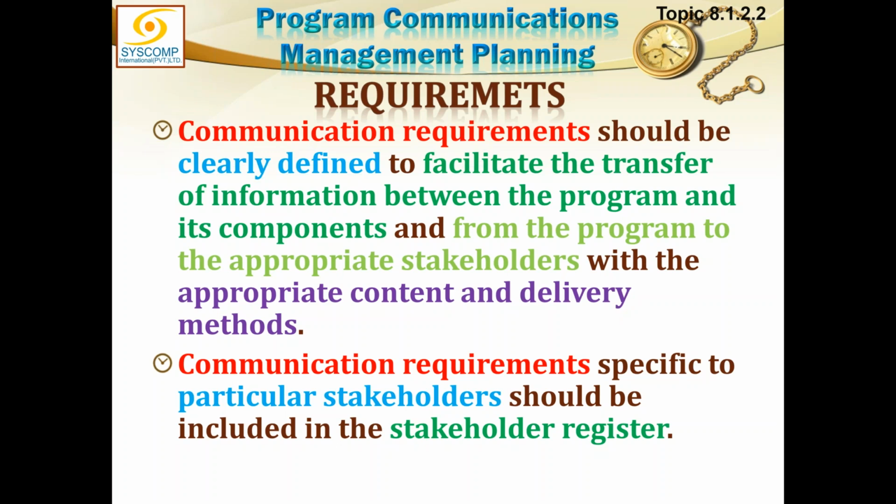Communication requirements specific to particular stakeholders should be included in the stakeholder register. So in stakeholder engagement, we develop the stakeholder register. In a column in the stakeholder register, you must specify the communication requirements of that stakeholder.